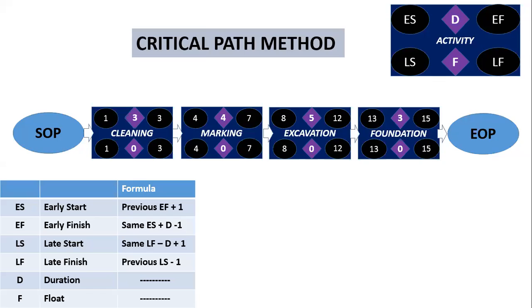This sequence, what we have performed now, is called forward pass. We are starting from the start of the project to the end of the project in a regular sequence. This process is called forward pass. You just make a note of it.